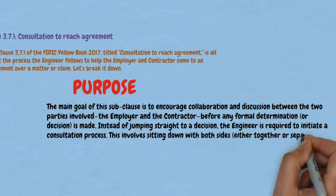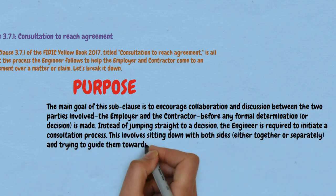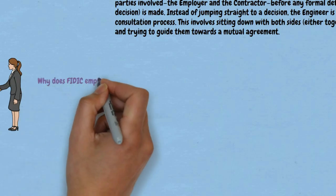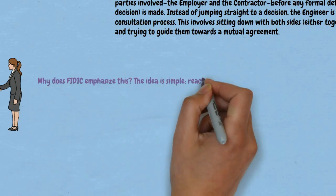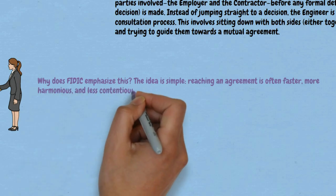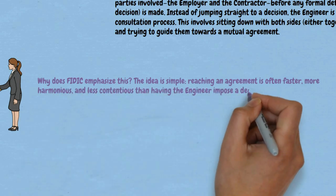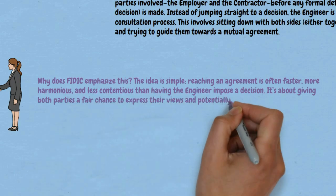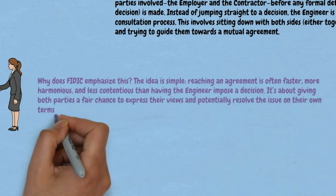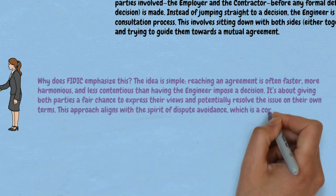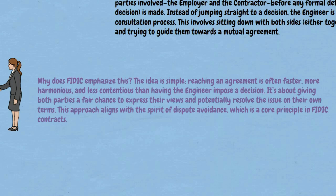This involves sitting down with both sides, either together or separately, and trying to guide them towards a mutual agreement. Why does FIDIC emphasize this? The idea is simple: reaching an agreement is often faster, more harmonious, and less contentious than having the engineer impose a decision. It's about giving both parties a fair chance to express their views and potentially resolve the issue on their own terms. This approach aligns with the spirit of dispute avoidance, which is a core principle in FIDIC contracts.